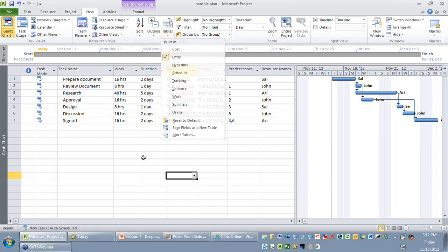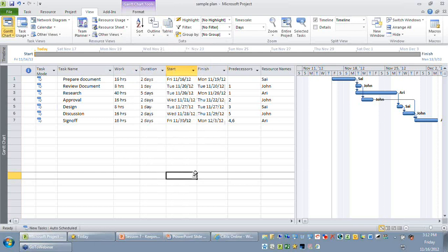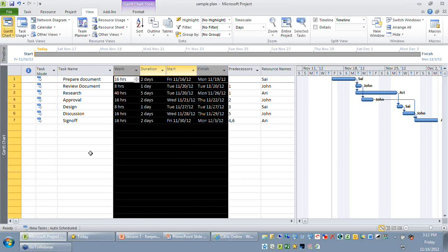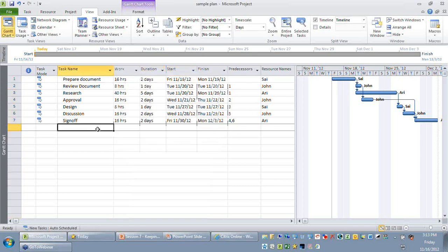So as you start executing the project, the values in the entry table will go across multiple revisions based on your progress. So when we talk about baselining, as I have already mentioned, we need to take a copy of this data and save it in a safe place. So these data are going to be updated into another set of fields in the task table, resource table, and the assignments table. But let's first check whether the schedule is already baselined or not.